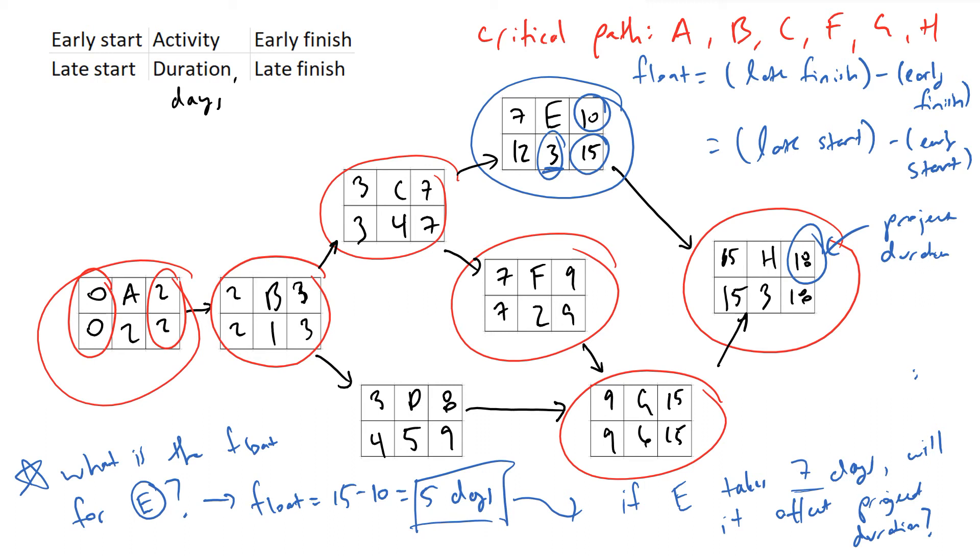And so what we see here is that this float value of five days is telling us that E can take up to eight days, which is three plus five. And as long as we're taking less than eight days on project or task E, it will not affect us. So the answer to this question is no.